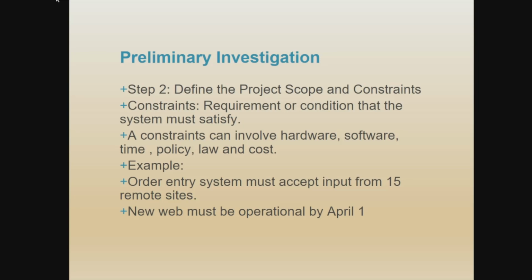It depends on what kind of system that you want to develop. So you need to be aware of the hardware, the software, the time, the policy, the law, and the cost. For example, you want to develop an ordering system. The order entry system must accept input from 50 remote sites. So that is the constraint.